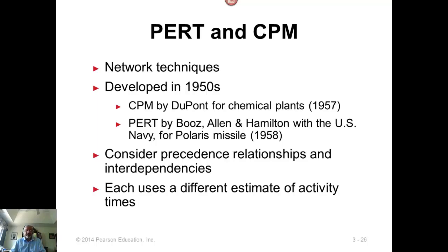More than 50-60 years ago, two different teams were working on a similar kind of project management tools. There was one group, which was an industry group, DuPont, and they worked on the project they had to manage, and they came up with this technique called critical path method. For them, the task times were pretty deterministic, and therefore they focused on trying to decrease the time needed to complete the project. That technique was called CPM, critical path method.